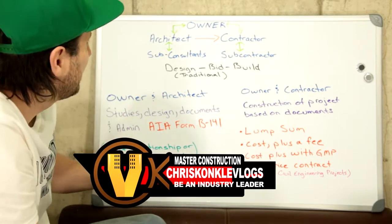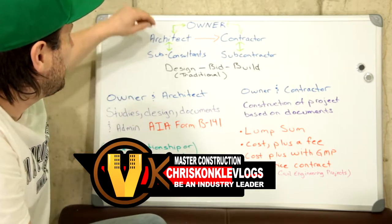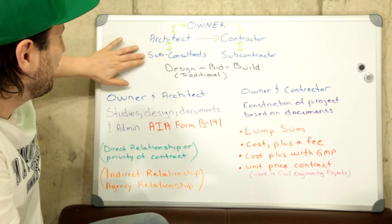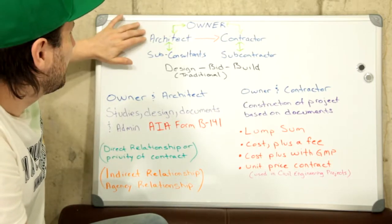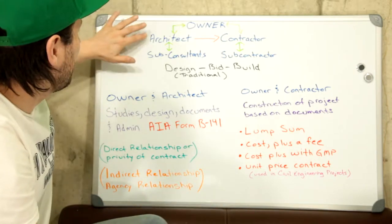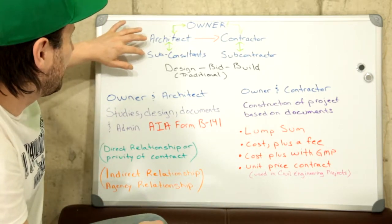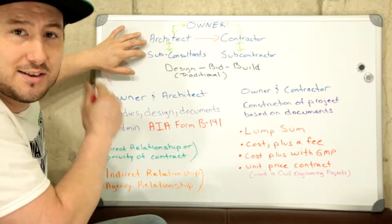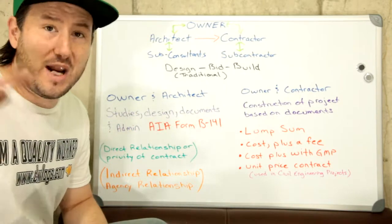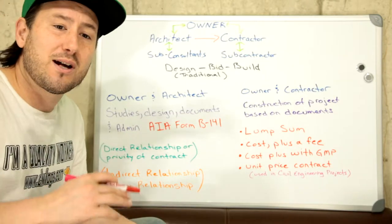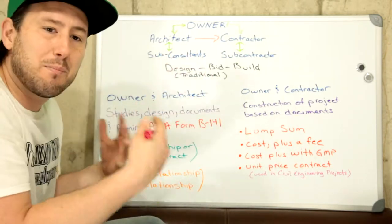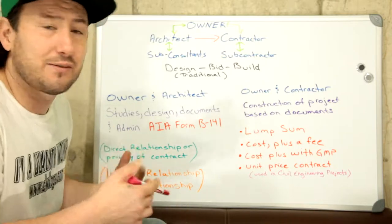The owner will go into a direct contractual — privity of contract — relationship with the architect. That form is the AIA, American Institute of Architects, form B141. Now, the owner has no relationship with the sub-consultants, who would be engineers and people like that. The architect enters into a contract with the sub-consultants, which is a separate contract we'll be getting into in the next episode.